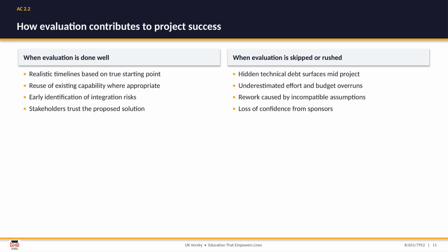It is worth weighing what good evaluation buys you against what skipping it costs. Done well, it gives realistic timelines because you know your true starting point. It lets you reuse existing capability instead of rebuilding. It flags integration risks early, and it earns the trust of stakeholders. Rushed or skipped, the opposite unfolds. Hidden technical debt surfaces mid-project, effort and budget are underestimated. Incompatible assumptions force rework, and sponsors quietly lose confidence. The lesson is simple. The time spent evaluating is repaid many times over.